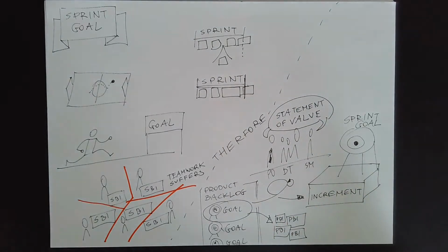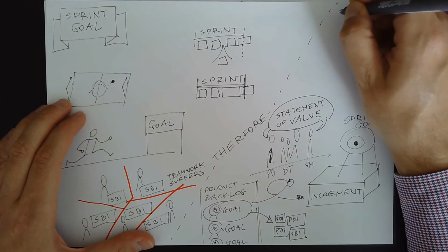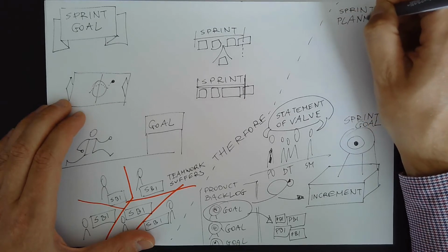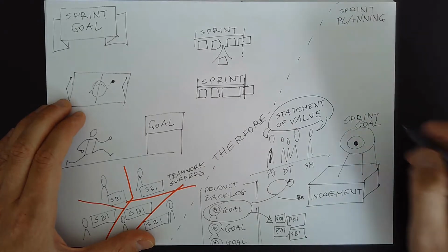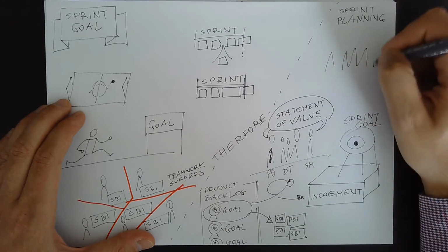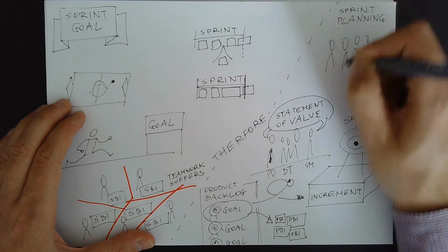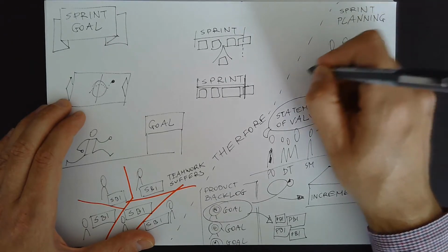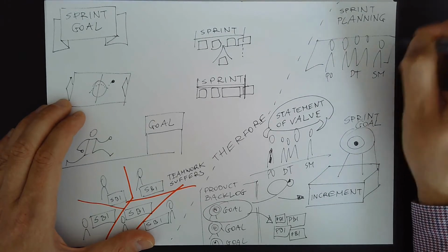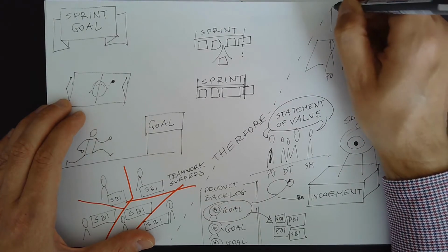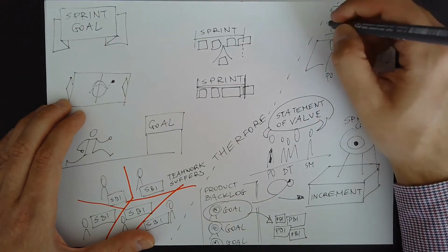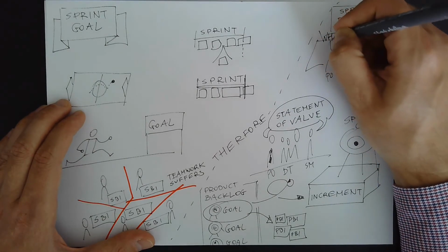During sprint planning, the Scrum team determines what they aspire to achieve by the end of the sprint. That is, in short, what the sprint goal is for. The development team defines the details on how to accomplish this sprint goal by creating a sprint backlog. A key output of sprint planning is that the development team should be able to explain how it can accomplish the sprint goal and how to know it has achieved the goal.